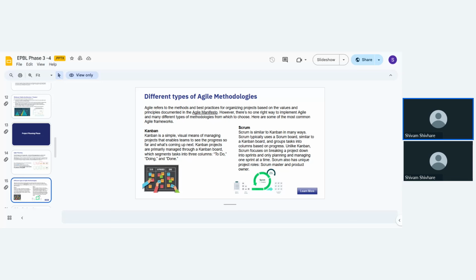It is a great way to complete your project and keep track of it. It is a workflow that helps identify bottlenecks. For example, imagine a t-shirt printing business. A Kanban board would have columns for order received, next a design, next printing, and we can add columns as the business model requires. So this is how we can use Kanban in our project development efficiently, right?